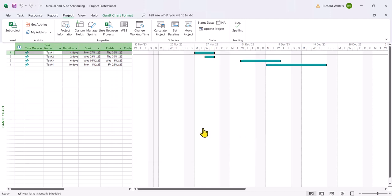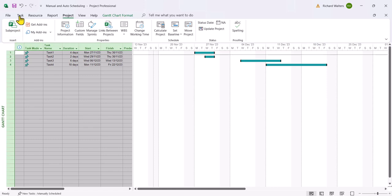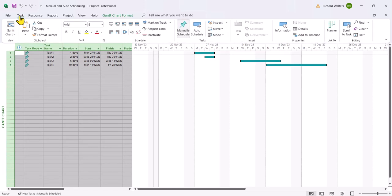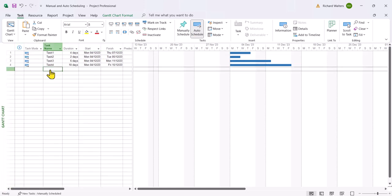So I'm going to now update these four tasks to auto scheduling. Now I've made changes in manual scheduling, go to the top left and highlight all tasks, go to the task tab and I'll go to the tasks section of the ribbon and change to auto scheduling. Now this now takes me to a different symbol. It's a blue rectangle with a little arrow underneath it. I've got the slightly different looking blue bars in the chart area of a Gantt chart.